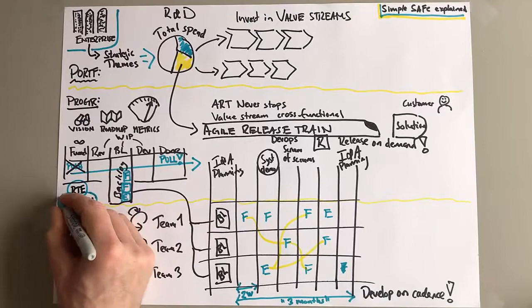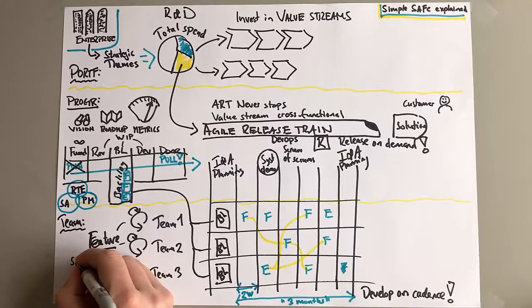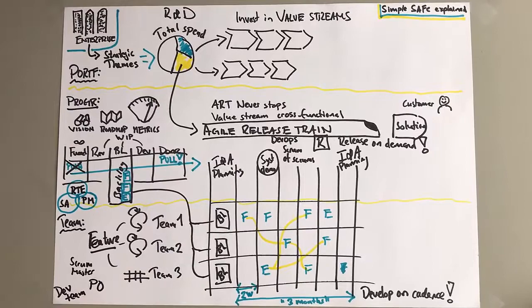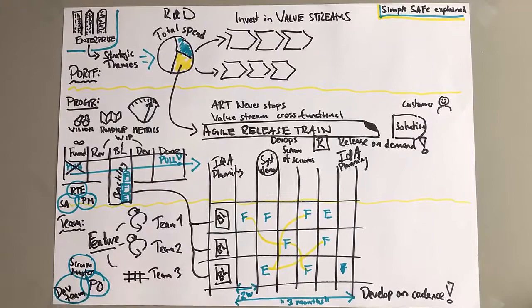Now people - on the program level you have a program management team, so we call it that. But you have the trinity of responsibilities here: a Release Train Engineer which is a sort of program manager, you have a Product Management which is a sort of a business owner for the program and the release train, and you have a Solution Architect with the overall responsibility for architecture and technical practices and those kind of things.